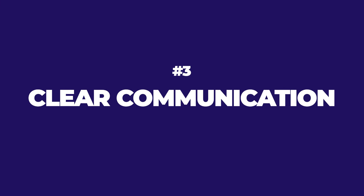Number three: clear communication is a leadership concept that is absolutely amazing. Clear communication from the construction company to the project, from the project management leaders on site back and throughout with the trade partners, making sure your meeting system has a flow to get communication all the way to the workers and foremen — and that deliverables, like a production plan, communicate to the worker and foreman level with feedback loops. A lean company is where your leaders and your people boots on the ground get closer together with a feedback loop. Both communication channels must be open, which is why I love the morning worker huddle.